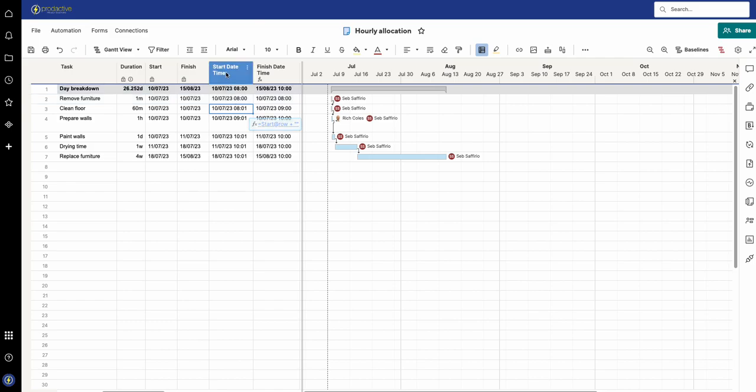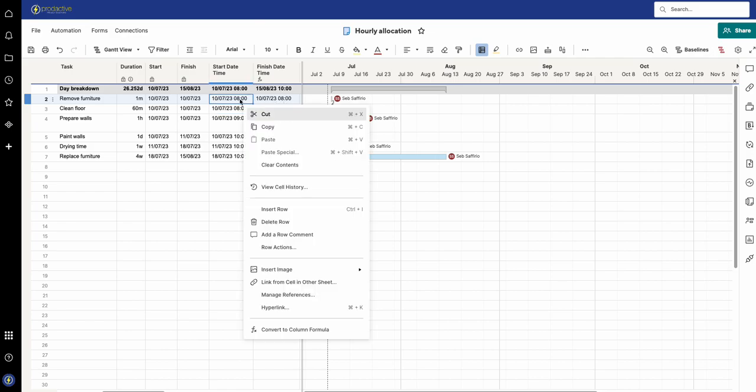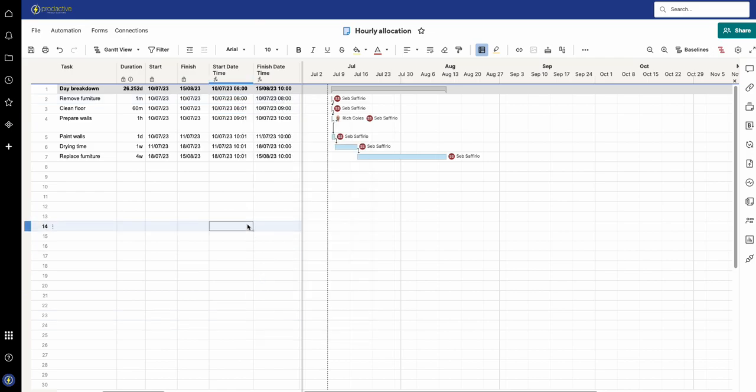What I've done here is I've said what's the start date time and then I've said what's the finish time. So I'm going to turn this to a column formula now so it's locked and then you can see one minute.